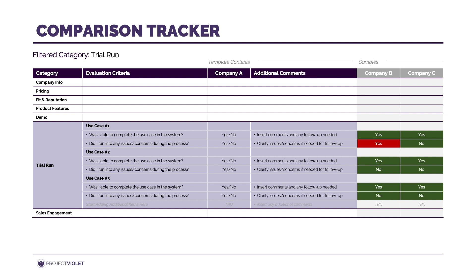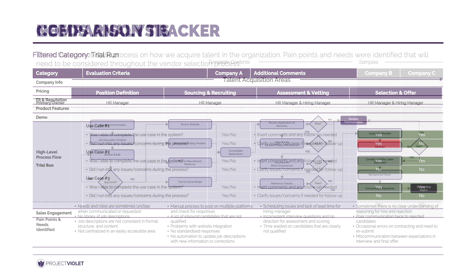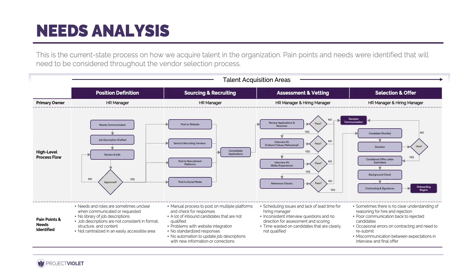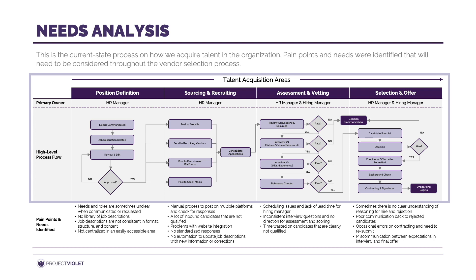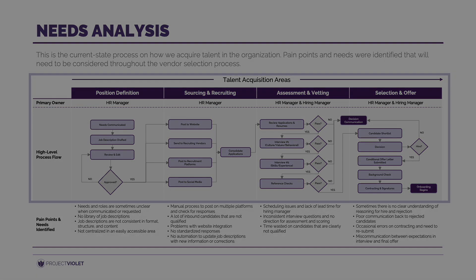Come up with a couple of use cases that each evaluator on your team will try to replicate in the system. They can each document in their own tracker and then compare notes. Go back to your needs analysis and leverage that current state process flow to see if you can replicate parts or the whole process end-to-end in the system. For example, have different team members play the role of candidate, hiring manager, and interviewer to see how the system functions for each role.